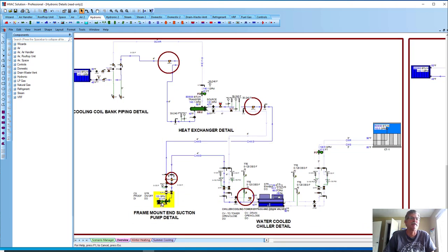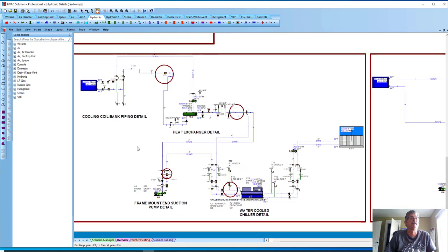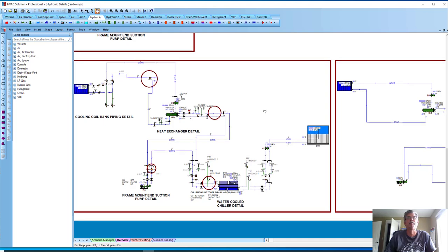They're 61 feet, 3 dirty strainers. Well, let's take a couple of them out, right? Let's take this one out right here, that one right there, and you'll see the head's going to go down by 4 feet. Okay. So that's one beauty about modeling the project. You can work out issues in that as a design build contractor with the engineer, find things that aren't piped right or correctly, and get them corrected before you're piping it up in the field.